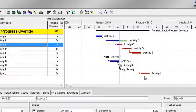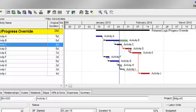When you schedule using progress override, P6 will ignore the network logic and schedule the remaining duration of the successor activity from the data date.